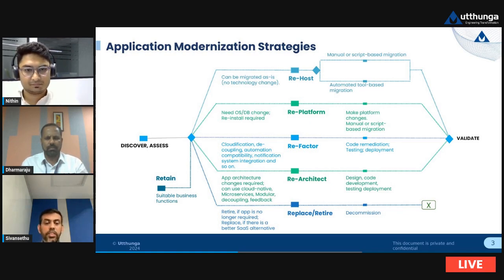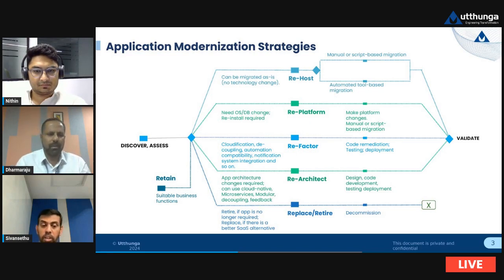And before going to the second strategy, I would like to open that slide, which talks about the strategies. Just as Dharma said, which systems, components or supporting applications need to be retained, require rehosting, replatforming, refactoring, or rearchitecting, and the retention of unused business functions. And the third strategy is IBB, incremental building block, where we break the transition into smaller manageable phases, right? And prioritize the modules based on three conditions: business value, technical feasibility, and of course the risk.